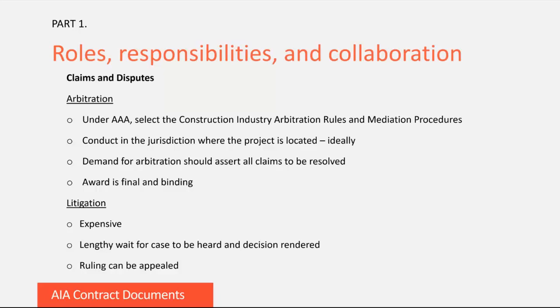When filing a demand for arbitration, be sure to assert all claims that you want to resolve. An arbitration award is final and binding, meaning that the final decision cannot be appealed within the arbitral institution or to a court.